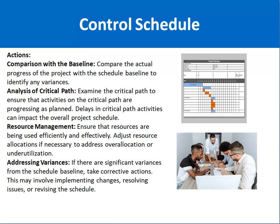Key actions during the Control Schedule process include comparison with the baseline — comparing what was decided in the planning phase against actual progress. Analysis of the critical path ensures that activities on the longest-duration path are progressing as planned, since any delay on the critical path will delay the overall project. Resource management ensures resources are used efficiently, adjusting allocation to address over-allocation or under-utilization. Addressing variances means analyzing planned versus actual — for example, if a task was planned for 10 days but took 15 days, there is a five-day delay.